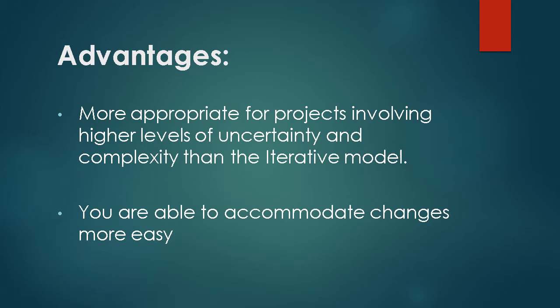Each iteration in the adaptive models must address not only task completion for newly defined functions and features but also further solution definition through function and feature discovery. It is the discovery part of the adaptive PMLC models that sets them apart from the iterative PMLC models. And the other advantage of the adaptive lifecycle model is that you are able to accommodate changes more easily.